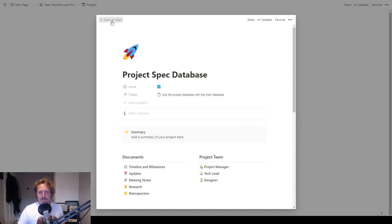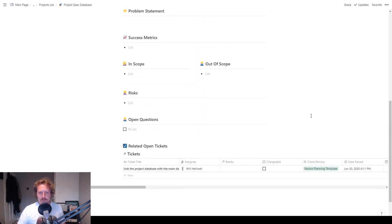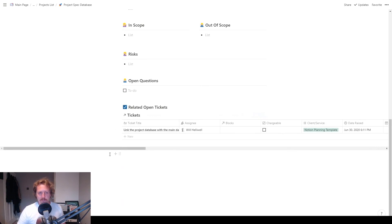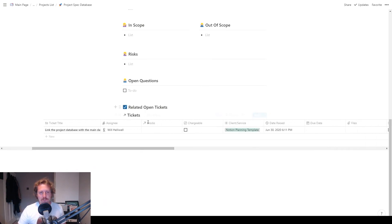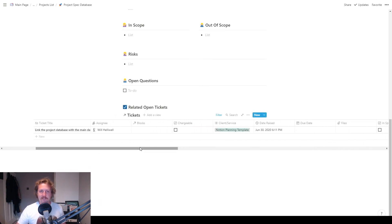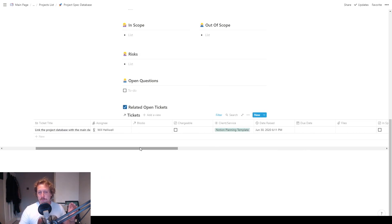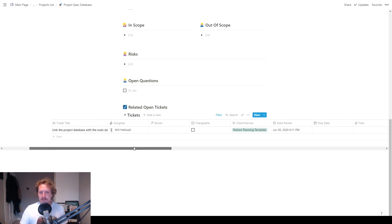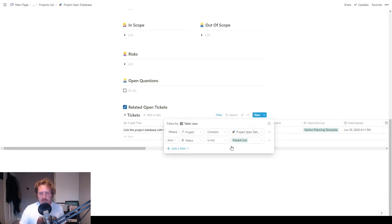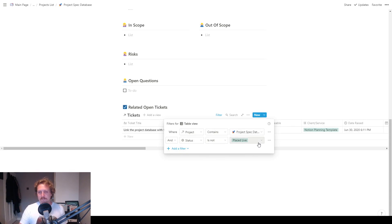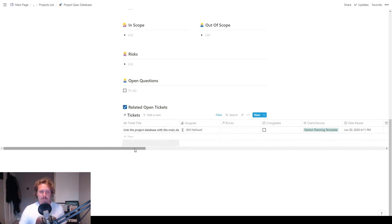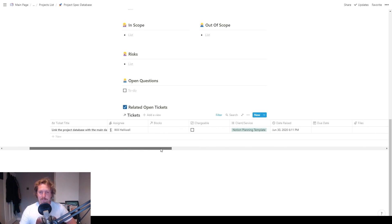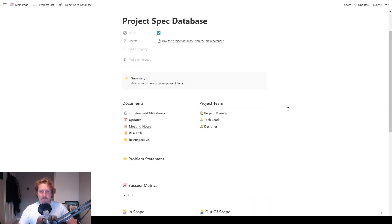If we go in there and we scroll down to the bottom quick, you can see we've got related open tickets. So we'll have a nice table view of all the tickets that are related to this project, but not just all the tickets, it's going to be all the tickets that aren't completed. So if you go to the filter, you can see where project contains, and then this is the project and status is not placed live. So as soon as the ticket gets placed live, it can come out of here. So we don't need to know about it anymore. We've done the work, it is live, it is done.